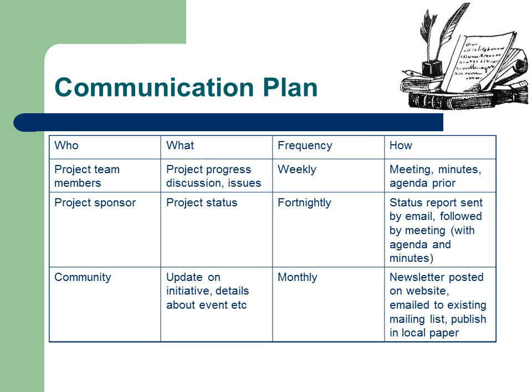An update could also be published in the local paper and also on the school's internet site. Failure to have a working communications plan and appropriate triggers can result in forgetting to keep people informed, especially when there are periods of high project pressure. A communications matrix is also a very important tool for summarizing project reports and meetings. Refer to the example in Appendix B on page 8/25 of your UNEP textbook.